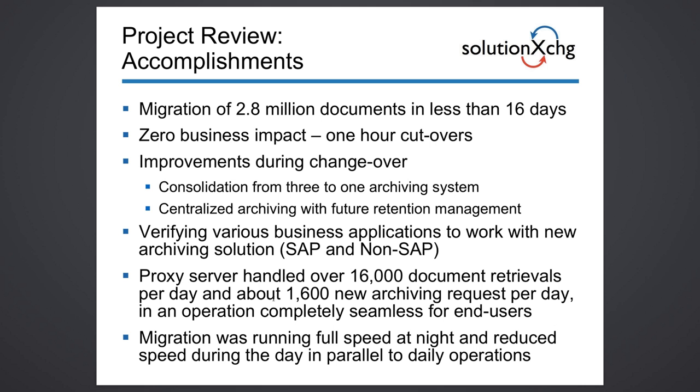We throttled down migration a little bit during the day and ran at full speed at night to make sure that we were not impacting any end users.